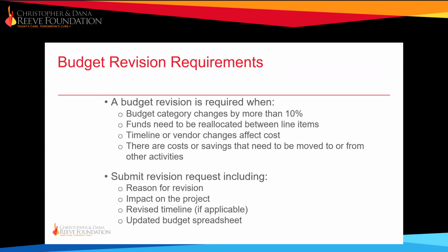The last item that would accompany this request is the revision file. Again, download the shared file, enter the year-to-date expense amount, and add a column labeled Budget Revision Requested. Keep in mind that funds that have already been reported as expensed cannot be moved. And that's why we'd like to see the year-to-date amount expensed.